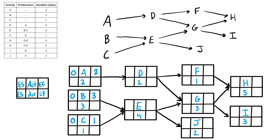We take the early finish of the predecessor and bring it into the early start of the successor. The two from A comes into D, and adding the duration gives an early finish of four. For activity E, we take the largest of the two competing predecessors — three or one — so we bring in three, and three plus four gives seven for the early finish. Activity F only has one predecessor, so we bring that four straight in and add the duration to get five.